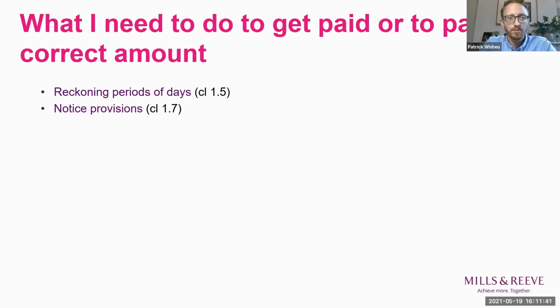I know Gary's going to talk about the notice provisions a little bit further later on, but for now it's suffice to say that any of these payment applications or notices need to be in writing and can be served by any effective means. So that includes email, unless the parties expressly agree not to. So that's something to bear in mind if you're agreeing a communications protocol or anything like that with the other side.